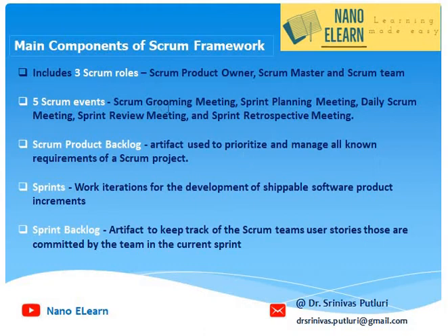The sprint grooming meeting is used to groom the user stories that are present in the Scrum product backlog. After grooming, a sprint planning meeting will be held during the sprint process. In this planning meeting, the team decides what are the user stories that need to be worked on in the current sprint. Then the next one is the daily scrum meeting.